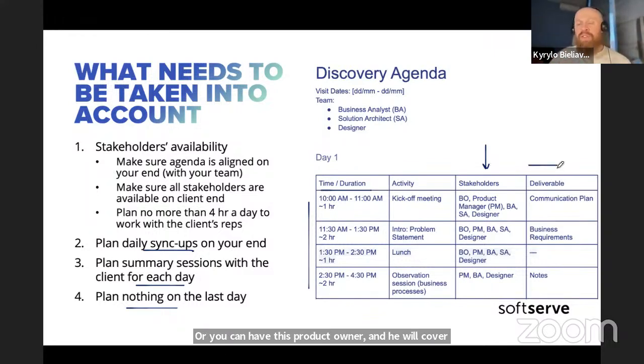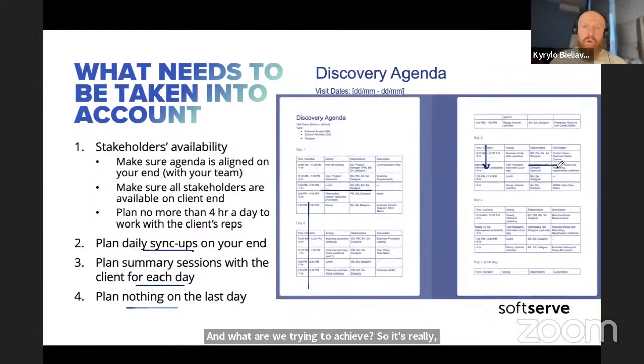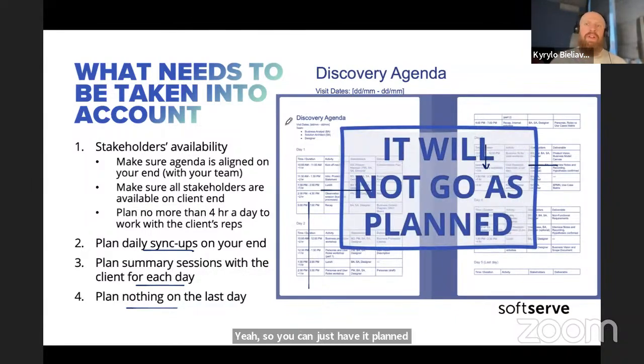And it's better to have some sort of deliverable planned as a result of each session, so it will be clear for you and for the client why we are doing that, what the goal of that session is, and what we are trying to achieve. So it's really important to prepare your agenda. The agenda can be made over several days, so you can plan it like in this example, but also make sure that you understand that it will not go as planned.